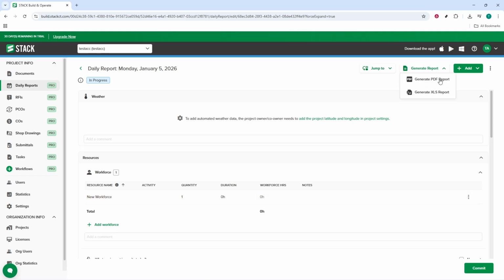Now assemble your narrative. Lead with the time frame, then summarize site progress from daily reports, calling out major accomplishments, labor utilization, delays, and any weather impacts. Follow with the schedule perspective from workflows, noting key totals for completed, overdue, and upcoming tasks. Keep the language clear and neutral so it's easy for stakeholders to understand.